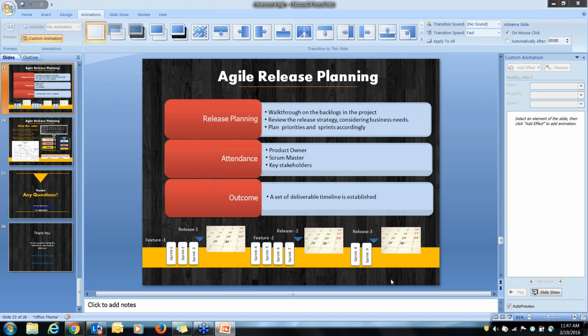But still, if you go with a fixed price in the project, when you are charting down the project requirement and signing off the project, you have to specify a timeline. These are the number of requirements. Up to this particular percentage, you will be able to pick up the changes in the requirement. If it goes beyond, then you have to change the whole scope of the project and the costing and all of that.